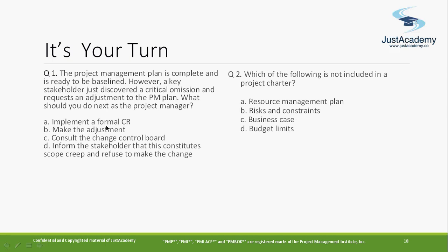So the implementation here is not important, because we are not in the execution phase. Consult the change control board? Since there is no change request, why should I consult the change control board? Because my plan is still not finalized. We are working on the planning phase right now. Inform stakeholder that this constitutes scope creep.